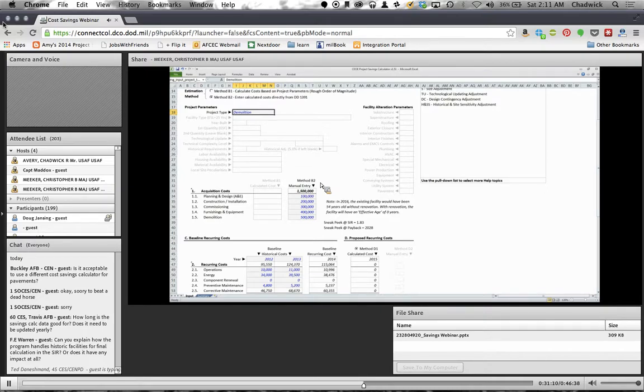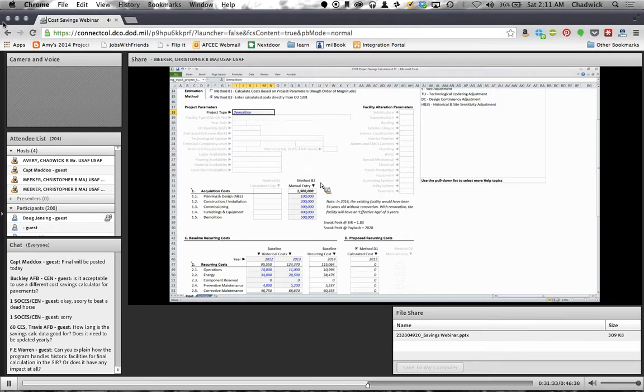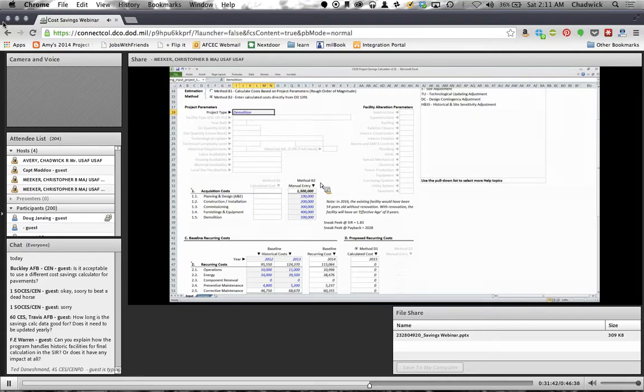The project savings tool, as I mentioned, does not get down to the component level where we can truly capture all those energy efficiencies. If that's what you're doing in your requirement, in your project scope, then by all means BLCC is the better tool for that. What we're really trying to get after in the calculator is O&M cost savings tied to corrective maintenance. Where our ops personnel are spending all their time fixing broken stuff is definitely where the project savings calculator is showing the most savings.